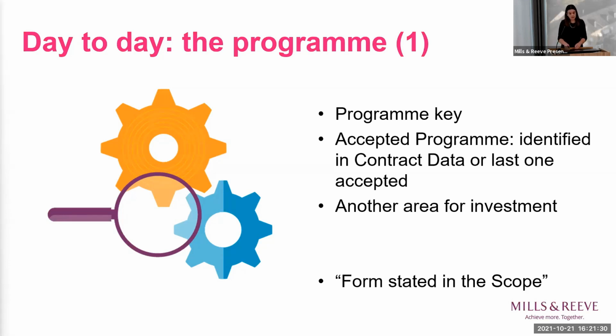Note in the programme clause 31, there's a little add-on that says the form of the programme should be stated in the scope. What they're thinking about here, and this is NEC4 wording, I think, is what sort of programme format you want, for example. It's usually a good idea to get programmes in native format as well as in PDF, so you can see what's going on behind the scenes. It may be also that you want to specify how you'd like it laid out, or how it would be most useful for you to look at as a client.